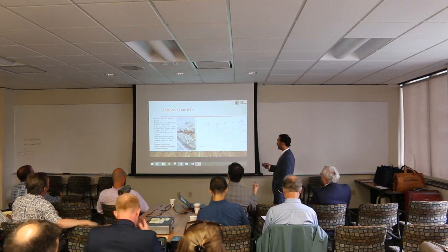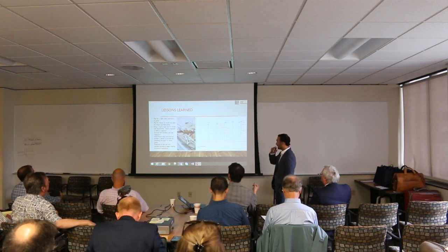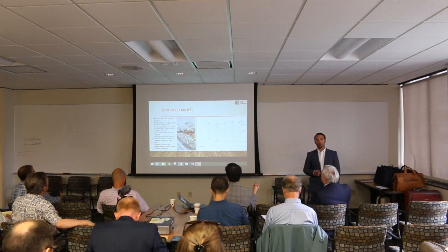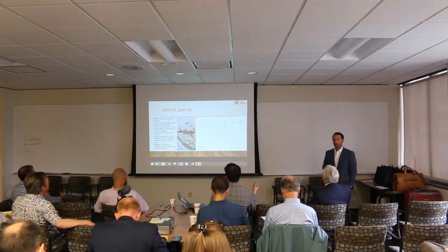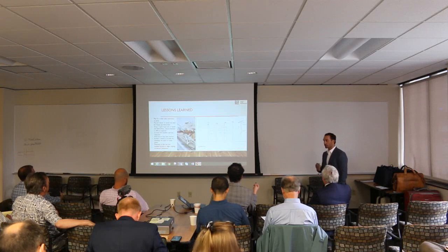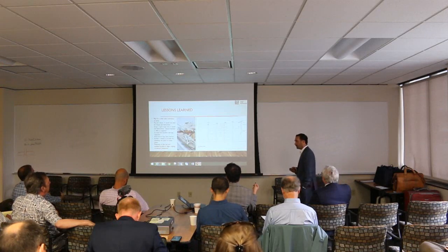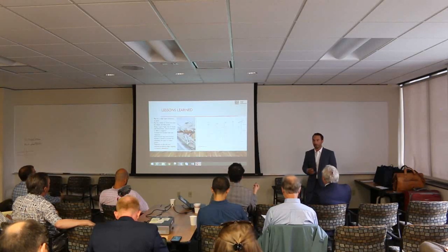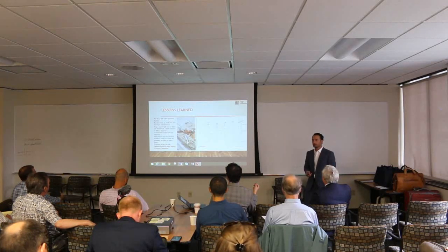One of the other things we learned was you probably want to plan around a 12-week lead time for the panels, to include those guys doing their shop drawings, building their model, RFIs, questions to build them and get them to the site. It worked well for us because we were able to do all of our foundation work within those 12 weeks and be ready for the panels when they showed up.